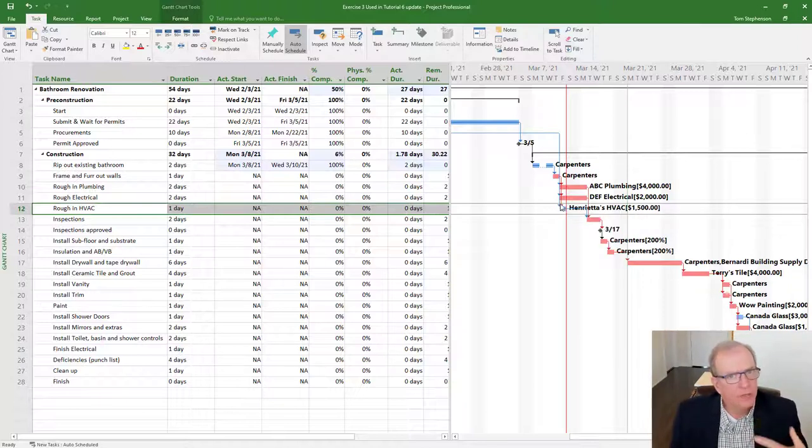You're updating the schedule to really reflect what's happened up to the status date. So nothing happened here. So I don't want to just leave it zeroed out. I want to reschedule it. So up here you see this move icon. I use this one fairly carefully. Sometimes I might put a start to start and change the relationship to move it. But because this is going to be moved right after the status date, I don't mind adjusting this.